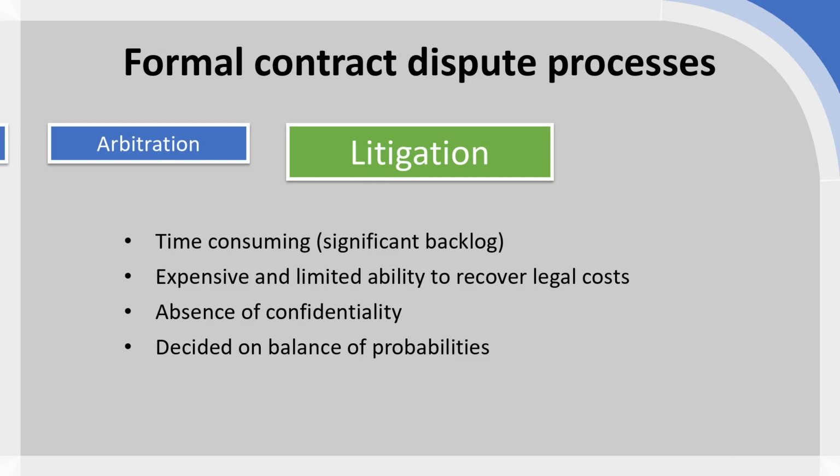while arbitration is often confidential by process, and there's no list of arbitration judgments that you can easily access and go through and see internal dirty laundry from companies. In the same way, mediation and conciliation are as a rule confidential, as is adjudication. Litigation is not confidential.